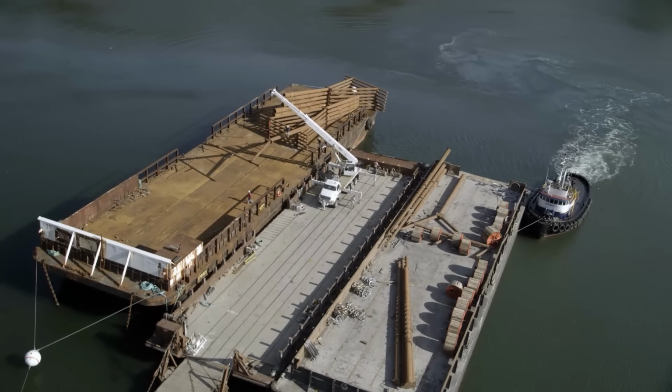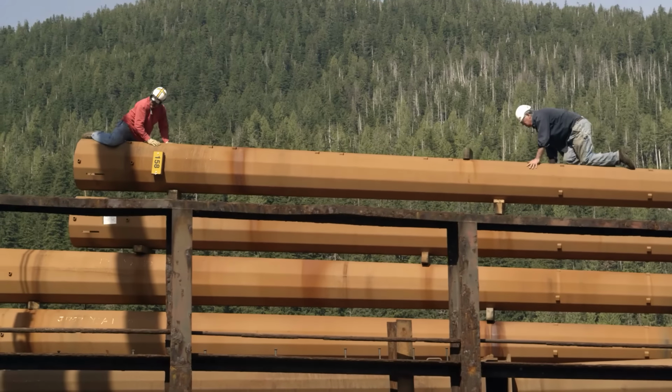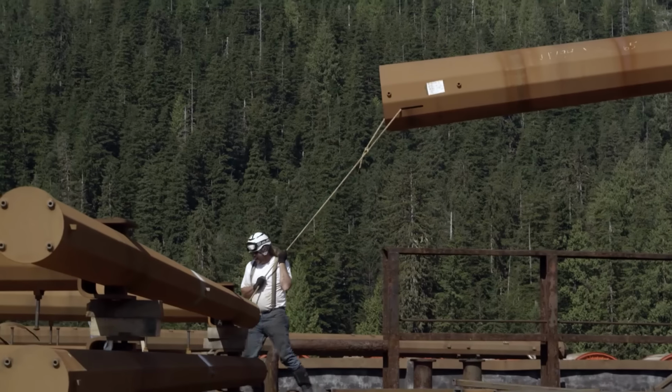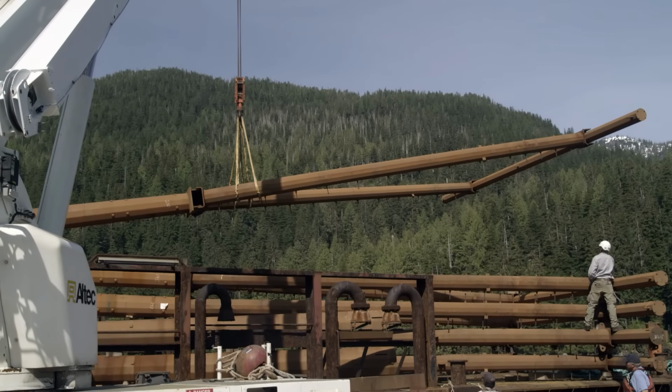3 barges rafted together in Anchor Pass with a boom truck in the middle with the pole structure stacked in order of pickup on the one side. Crews attached insulators, guy wires, and travelers to each pole, and then the boom truck moved them to the other side for pickup by the Sky Crane.